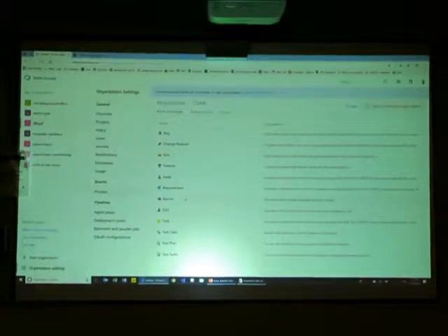If you want to have reviews, code reviews, design reviews, a meeting of any kind, then that's what that tracks. And then a change request lets you say, well, this requirement is going to change. Instead of change, like in Agile, we don't do that, right? If a requirement changes, change the requirement if nobody started working on it. If it doesn't hit the backlog, or it doesn't hit a sprint, change it. I don't care. If it has hit a sprint, you can't touch it, so if it's changing, you better add a new story to make that change.